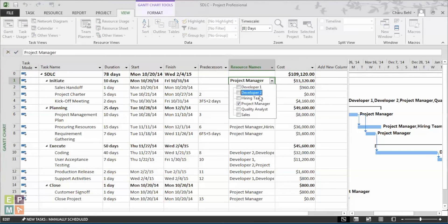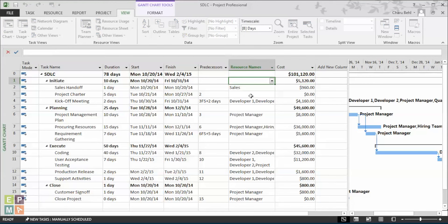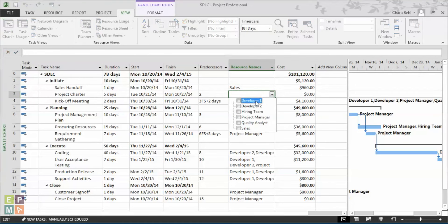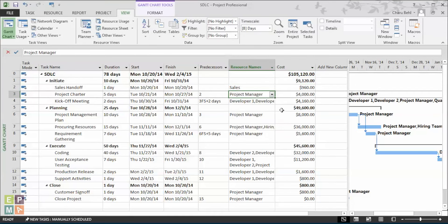When I assign the project manager to the actual task where he's required, you see how the cost drops down to $9,120, which is the actual figure.